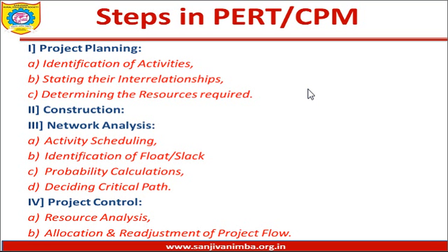The interrelationship is just identifying which activities are correlated with one another, which activities are coincidental to one another, which activities are dependent on one another, or which activities have a relationship that without finishing the first one, the second cannot be started, or which activities can work hand in hand, or what are the timings and what are the resources required to finish or to start the activity. So this is nothing but the interrelationships among various activities.